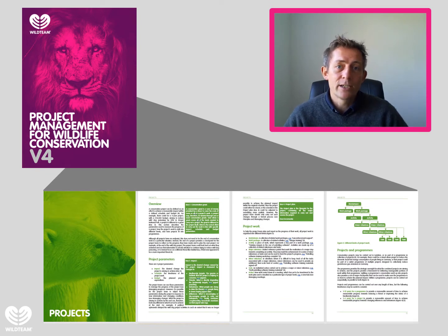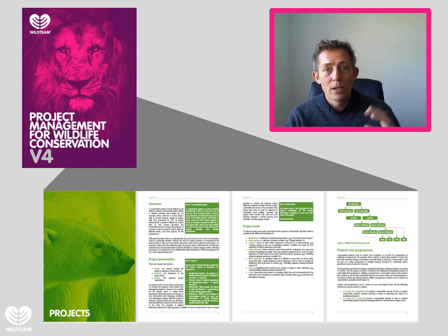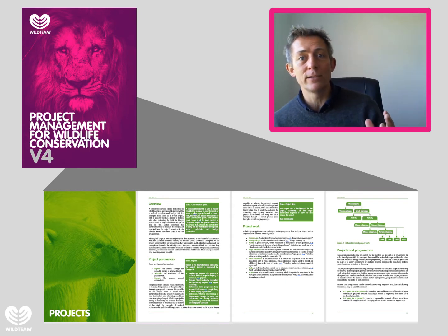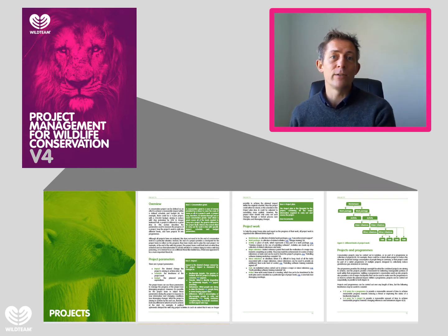In the project section, the project itself is defined, and it's described how a conservation project fits into a wider conservation program. Very importantly also, and this is a really important thing to get right for conservation teams, is how to name and split up different levels of work, right from a work package, which is a collection of activities, right down to an individual task that an individual would take on and do.